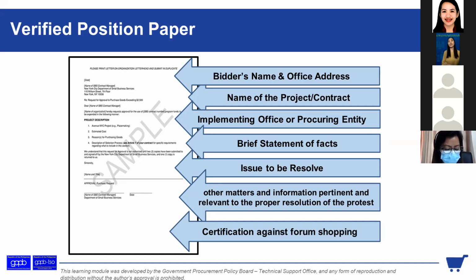Pagkalampas ng 7 days after the BAC resolution on the request for reconsideration, nag-submit ng verified position paper pero walang proof of payment ng protest fee, or merong proof of payment pero hindi verified yung affidavit, hindi pwedeng ihabol sa 10th day yung proof of payment tsaka yung verified na version ng position paper. Walang cure.